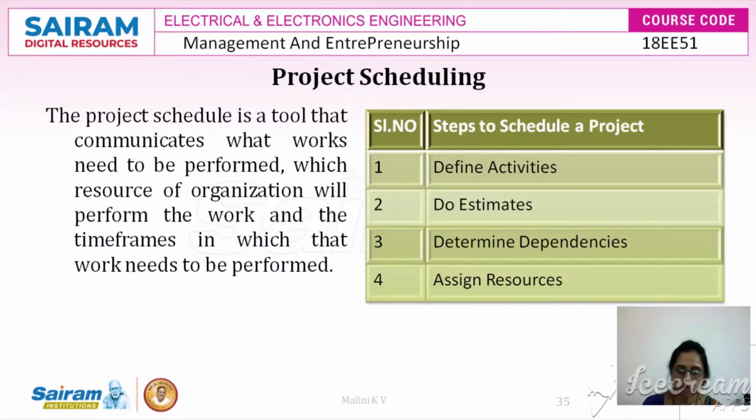So the process flow will have basically 5 different steps. The first one is certify the business case, the second one is rank candidate projects, the third one is evaluate the resources, the fourth one is determine the resource needs, and the fifth one is approve the project. So generate the capital investment for the project approvals, and then it will be easy to classify the investment projects. The project scheduling has to be done at the right time.